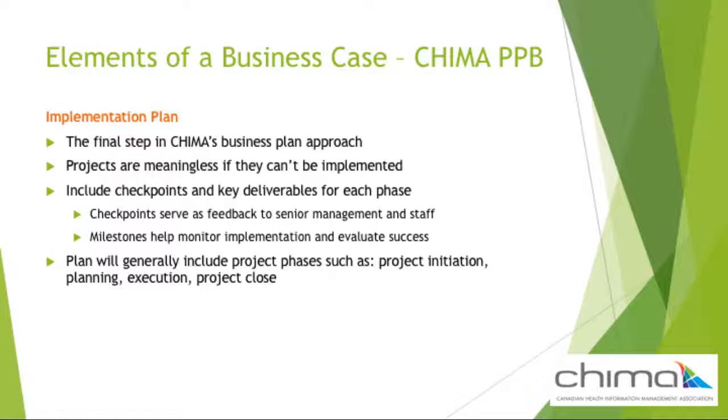The implementation plan will typically include project phases such as initiation, planning, execution, and close. Initiation includes early steps which are taken following approval of the business case before a full project plan is developed. These could include defining of terms of reference for the project team, recruiting the team, establishing project management structures and governance. Planning details the major project tasks and milestones.